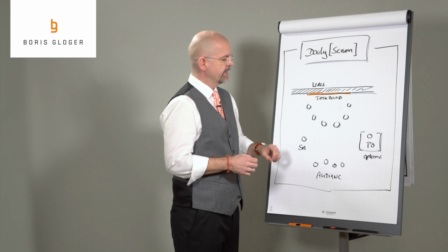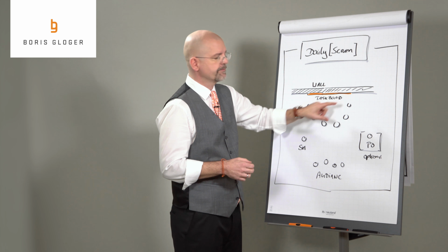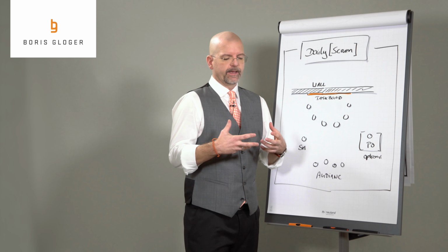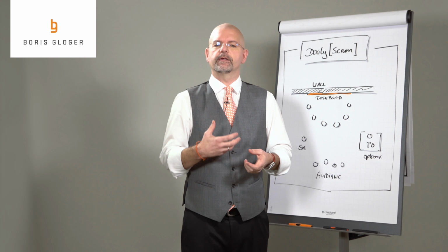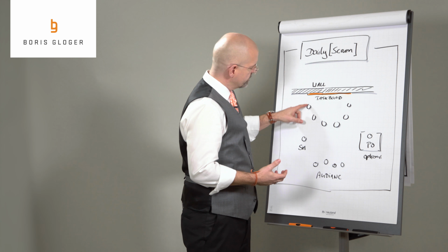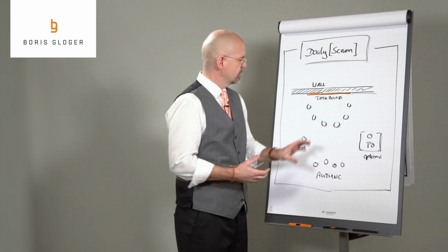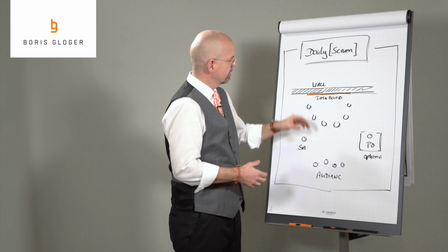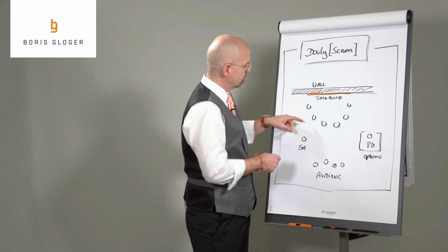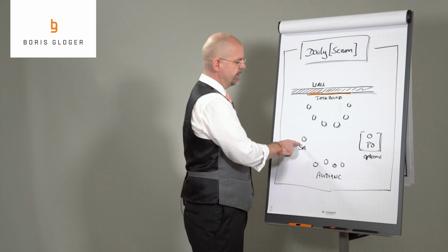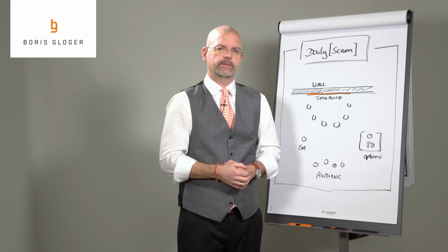And then a very important aspect is that the development team stands in front of this task board, and it turned out that it's a very productive and good practice to put the people in a kind of half circle in front of that board so that everybody can really see all these tasks on the taskboard very well. And the Scrum Master is not part of this circle. He stands more or less behind the development team.